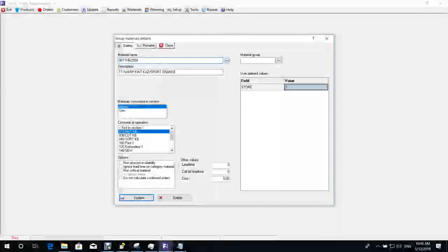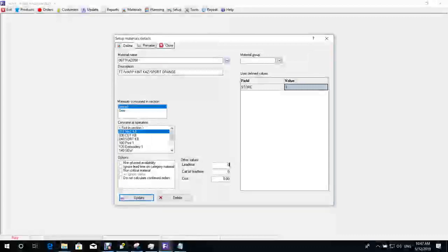Against our materials, we can hold things like lead times. When we are doing our MRP calculations, it will take into account the time defined against the fabric. Yes, we may start production today, but our fabric lead time is a week or 2, so we need to have our fabrics in 2 weeks before we start production. We take that number into account in our material calculation in the MRP window.